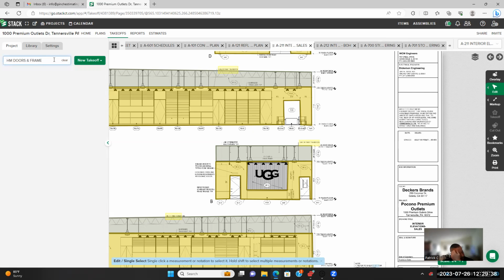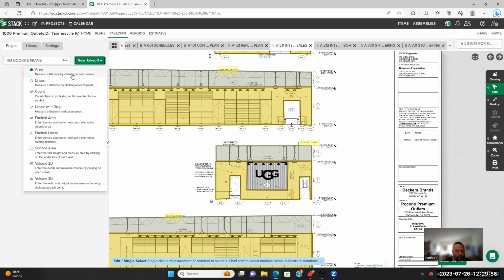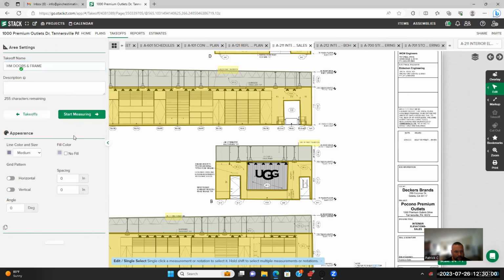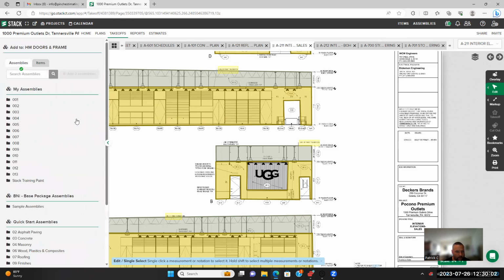is surface area. We'll just draw a line over the top and then account for whatever you put on the wall height, like 9 foot. So it'll count 9 foot down for the distance across. But since we're just staying on area, we're just going to do area because we want to figure out what our exact paint cost is going to be.